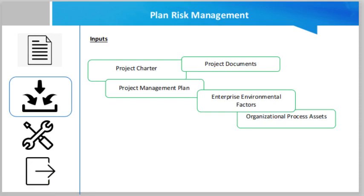The inputs for this process: first is the project charter, which documents the high-level project description, boundaries, high-level requirements, and risk. Then the project management plan — in planning project risk management, all approved subsidiary management plans should be taken into consideration in order to make the risk management plan consistent with them.